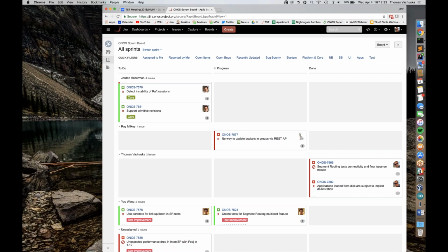Excellent question. The whole point of the milestone is to avoid having a large bucket of work that goes untracked until reconciliation at the end of the time period, when you may be greeted by surprises. So the idea is to segment that big bucket of work into a couple of buckets, which is what the sprints were doing before. But instead of forcing a periodic cadence and synchronized planning on everybody, which is what we're having difficulty with, we just let them identify some points at which they expect cohesion in the project.